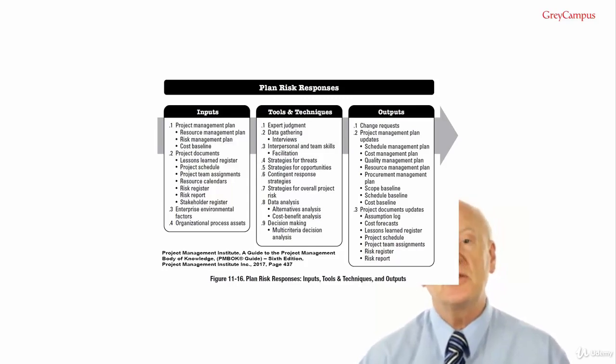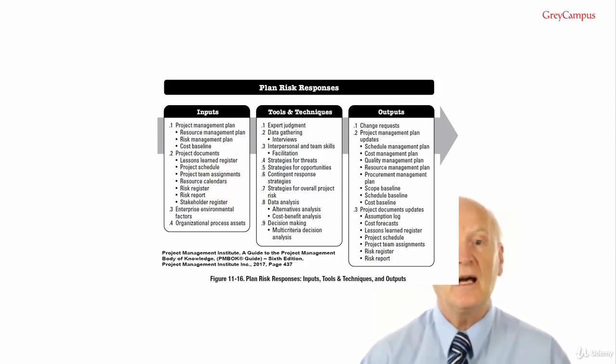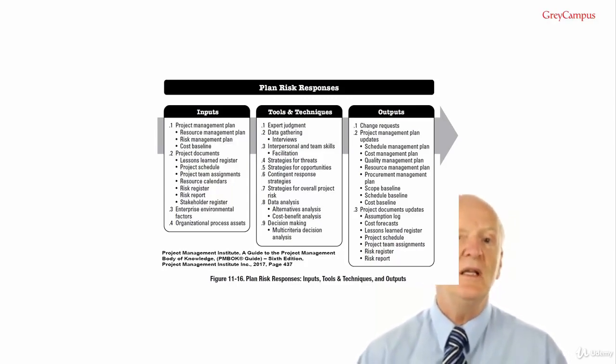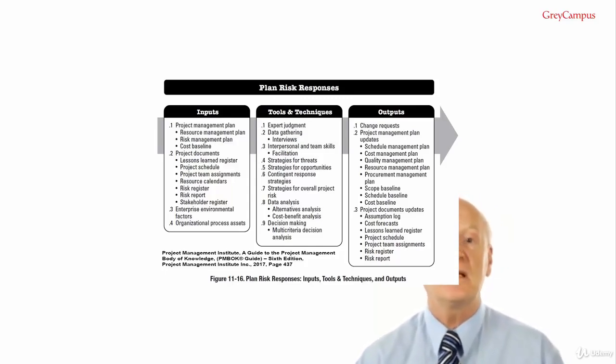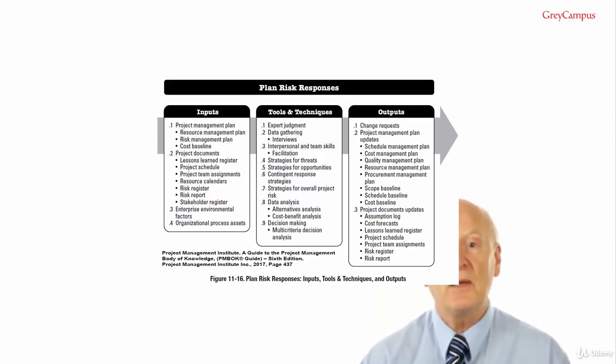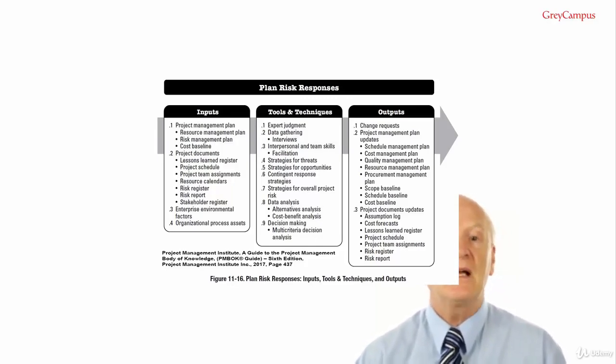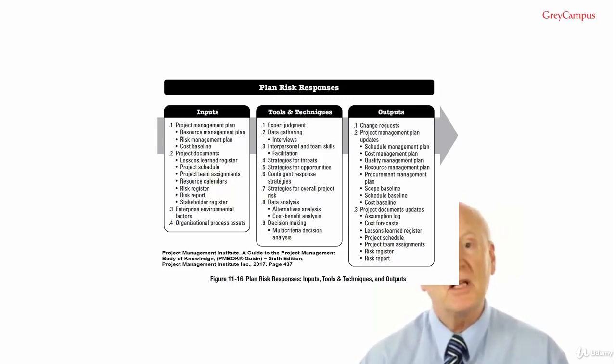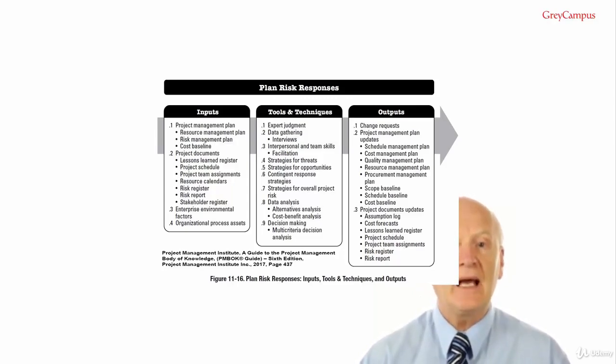Events that trigger the contingency response, such as missing intermediate milestones or gaining higher priority with the seller, should be defined and tracked. Risk responses identified using this technique are often called contingency plans or fallback plans and include identified triggering events that set the plan into effect. Please remember for the exam, a contingency or fallback plan is created before the risk occurs, but a workaround plan can't be created in advance.